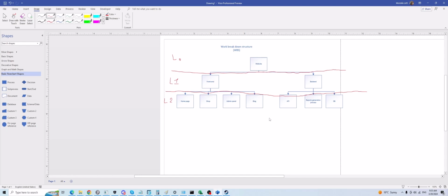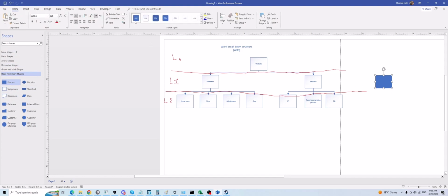When we complete the work packages of a project, there should not be any task or delivery that you cannot link to a work package. Remember this point, it is very important. For example, if someone tells me, hey Mustafa, marketing was also part of your project, which section do you consider the marketing tasks in? In that case I have a missing work package.